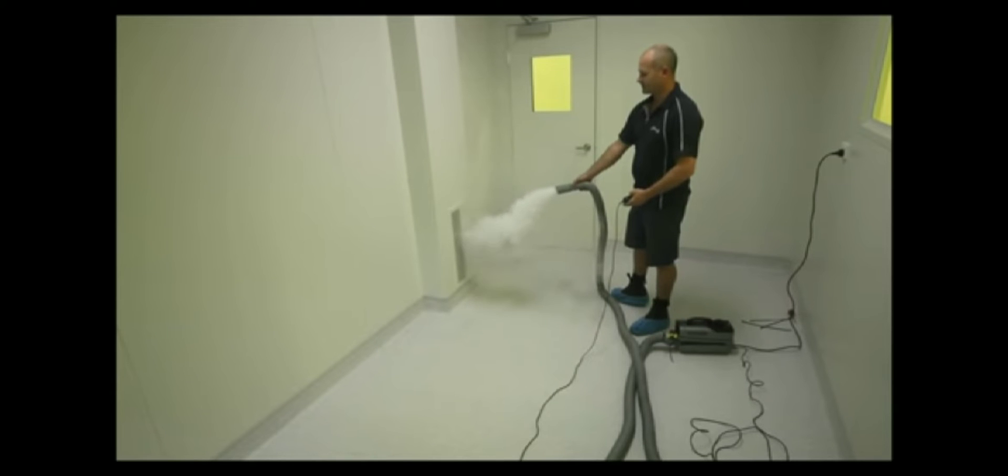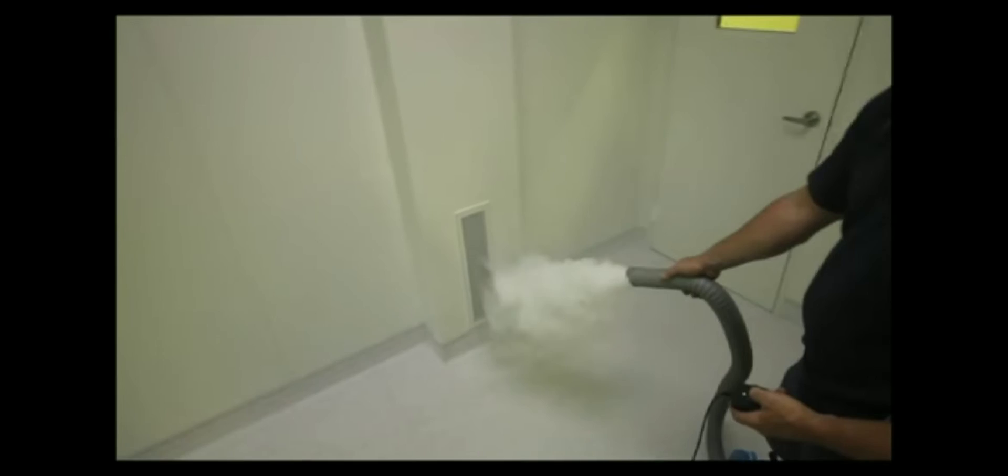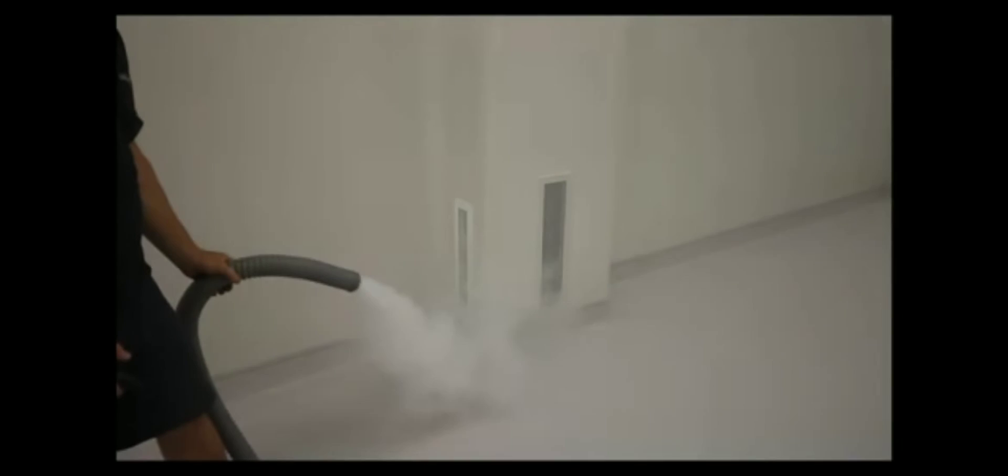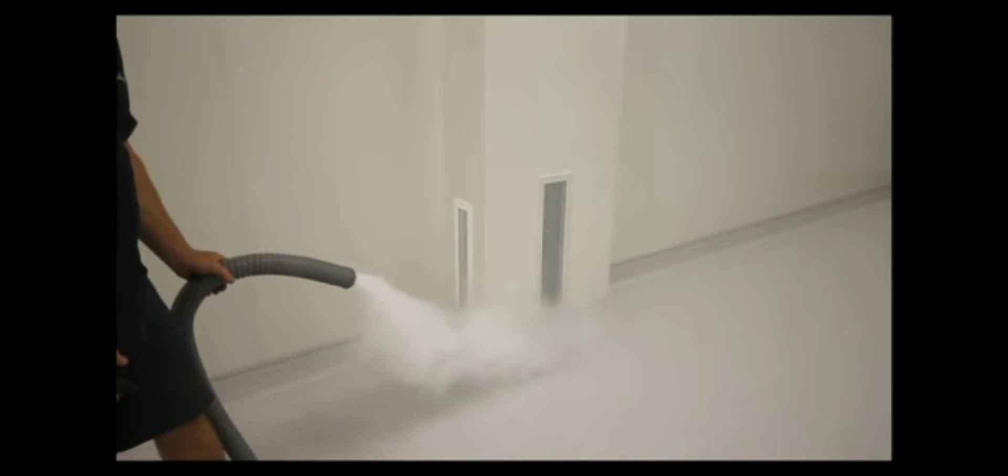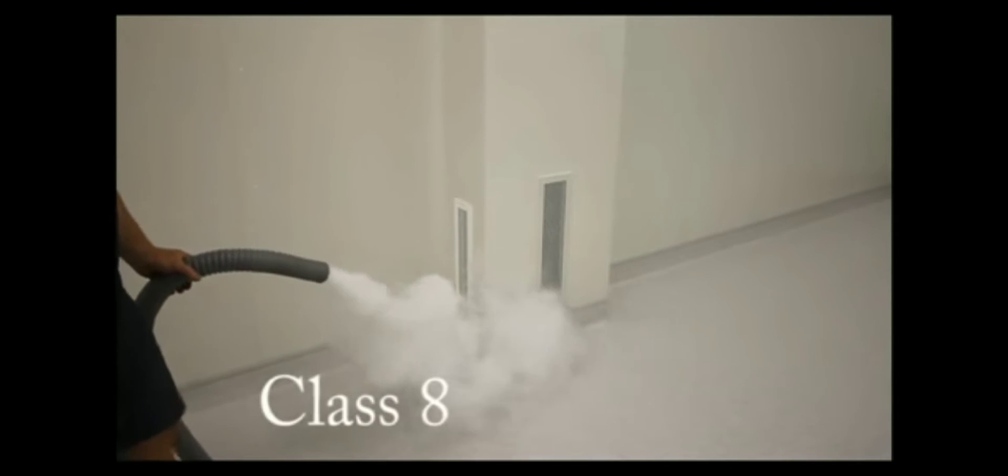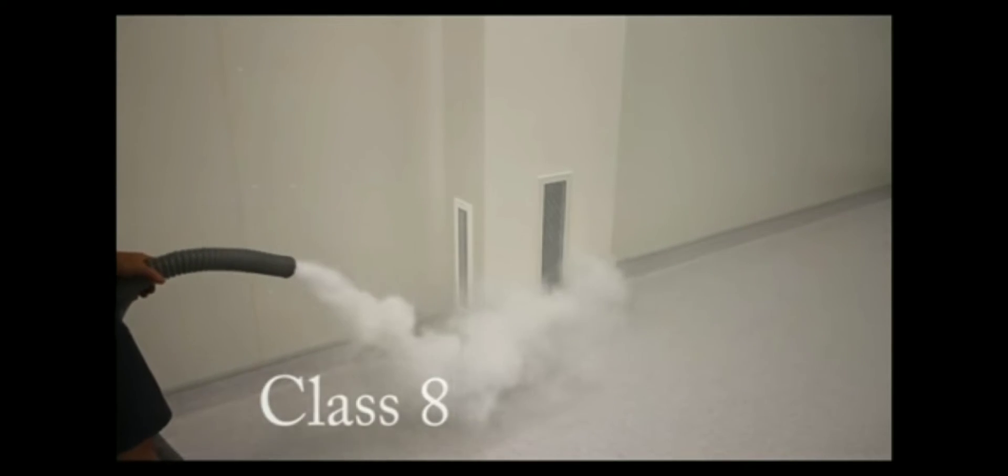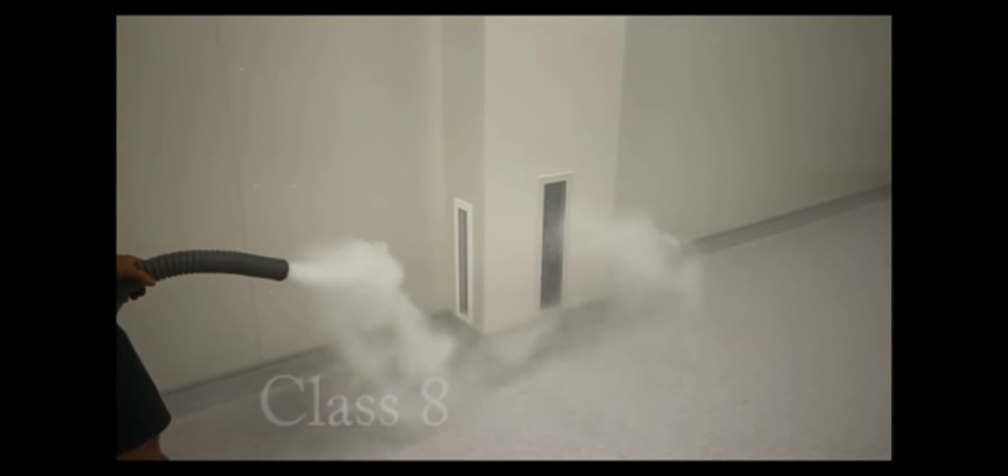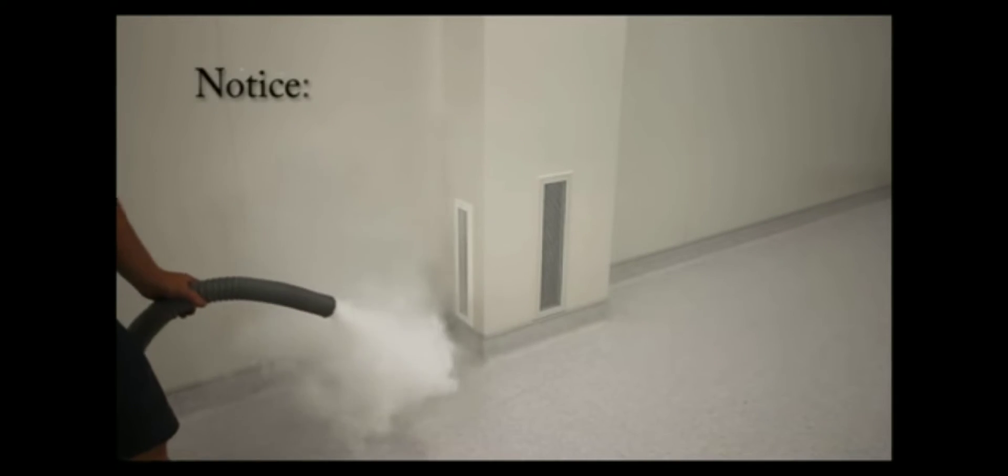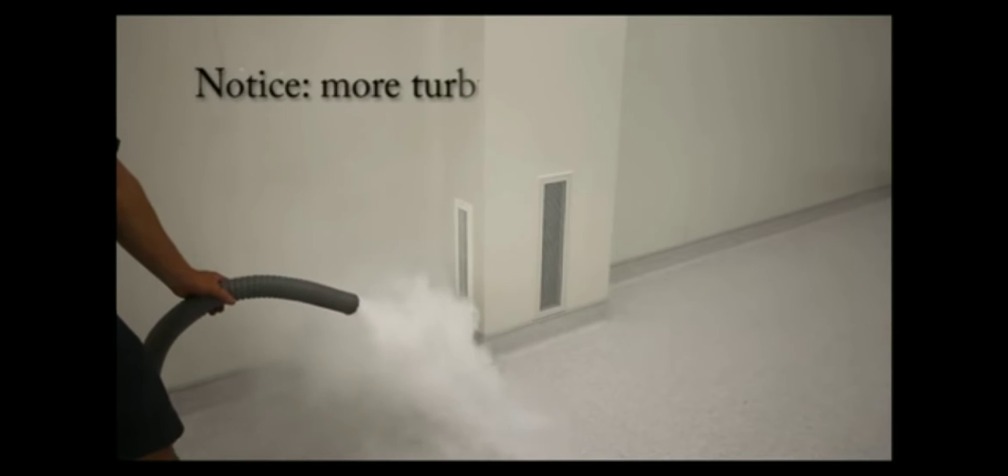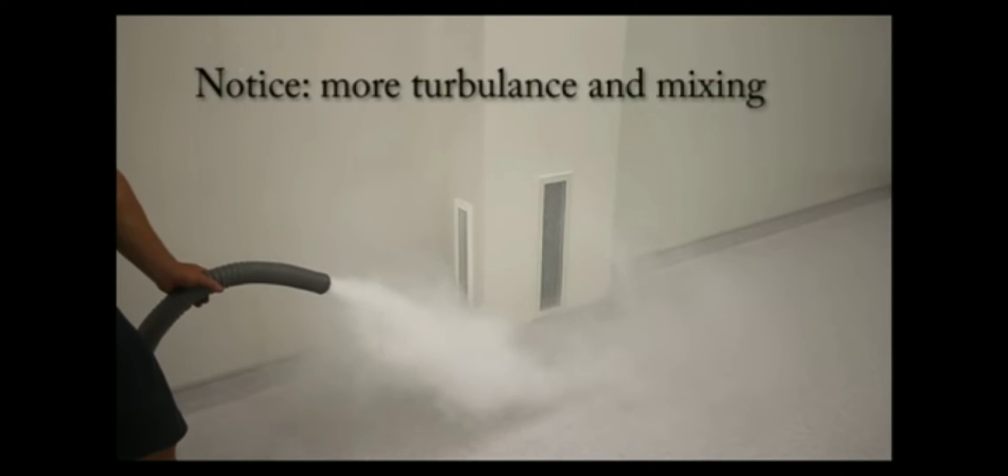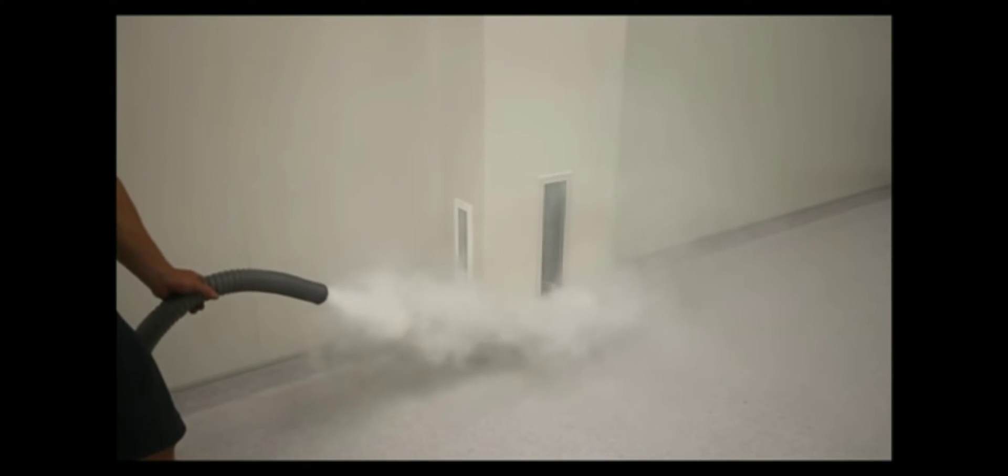Now as you are only going to be doing this on one or two occasions to prove your mixed flow or laminar flow, we take the opportunity at the commissioning stage while the technicians are still able to get into the clean room without gowning as the smoke is likely to contaminate the entire facility.